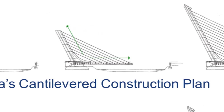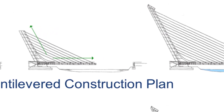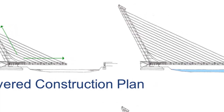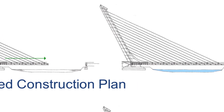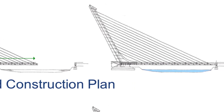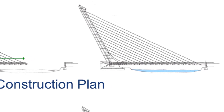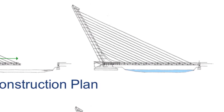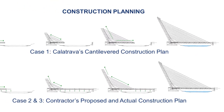Similarly, the pylon was to have its own cycle of operations, constructed with sliding formwork in segments where each segment corresponded to a single pair of cables to the deck. In this manner, construction of the bridge deck and pylon would progress in synchronized cycles, with each new segment connected by post-tensioned pairs of cables. According to this original plan, construction would have taken 24 months and been complete by August 1991.